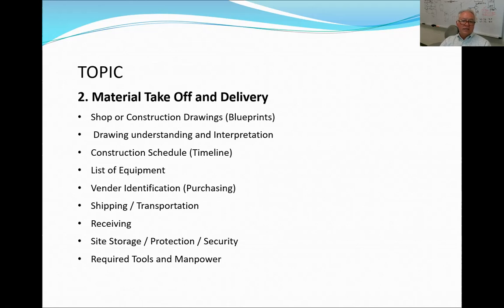The reason material takeoff and delivery is very important, especially on the receiving end: we received what we thought was a 24-volt inverter. The box said 24-volt inverter, but when we opened it, it was a 48-volt inverter inside a 24-volt box. But we've gotten that all situated now, so at least we have the proper inverter and we can move forward with the installation of our equipment and the build that we're going to be doing.